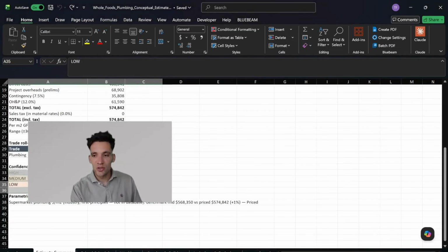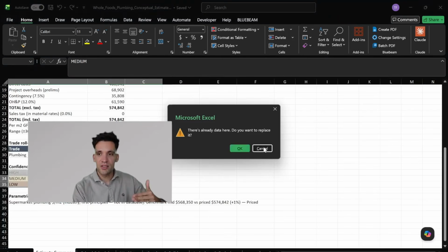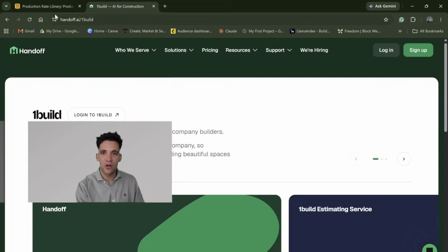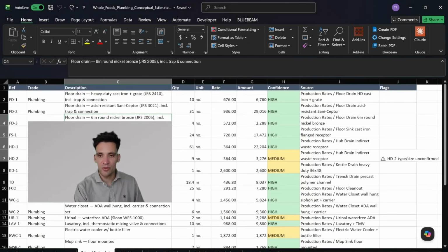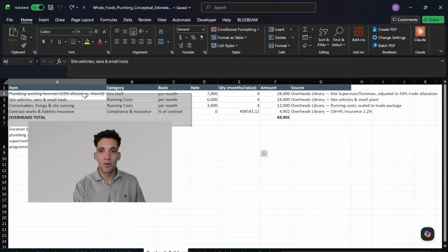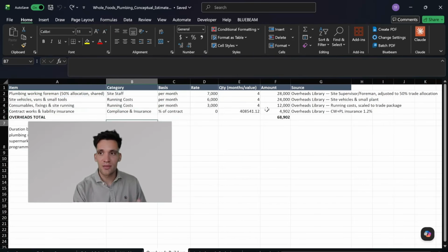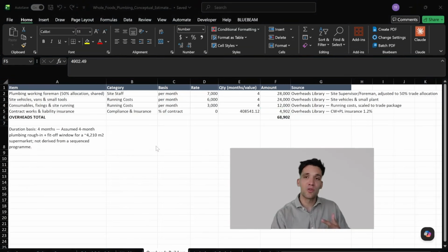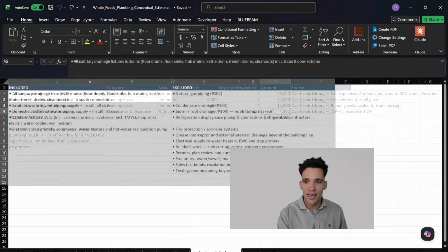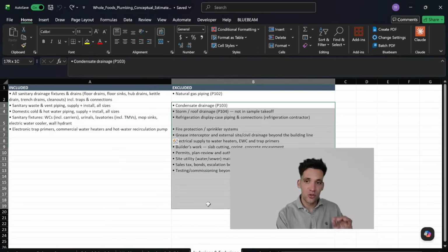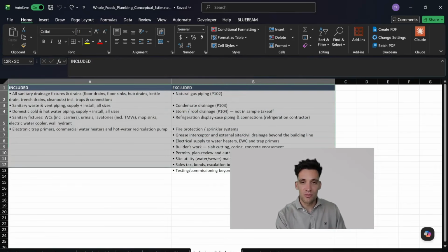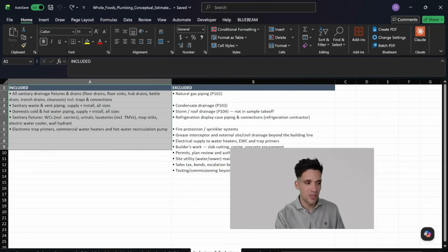And then the skill is told to run through the entire process to first calculate the direct costs and match these to the activities in our cost library as best as possible. Then it builds up our overheads according to the instructions I've given it. So again, you could have your own overheads library that does this. You'd have different ways, but it will need to estimate the duration of the project through this. And then all of this is documented as inclusions and exclusions. Any missing information, anything it didn't have access to, it's explicitly told to make sure it's covered in the inclusions and exclusions.